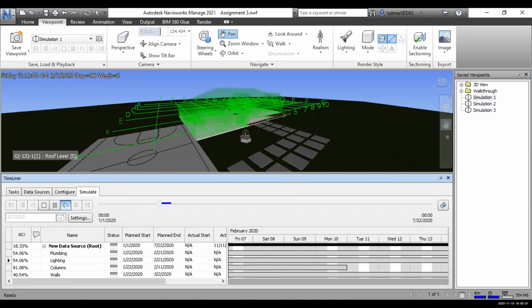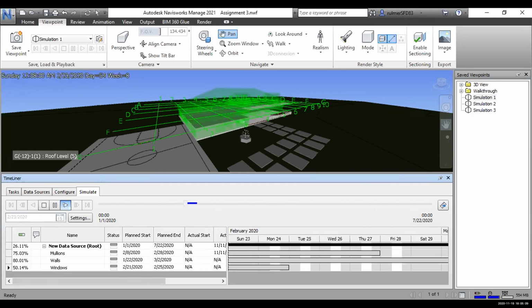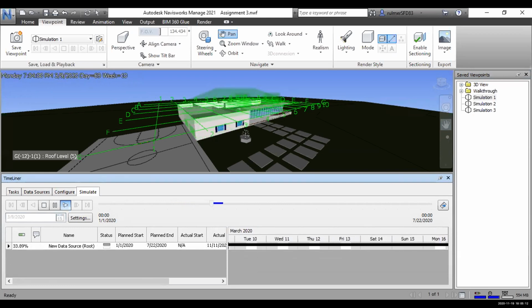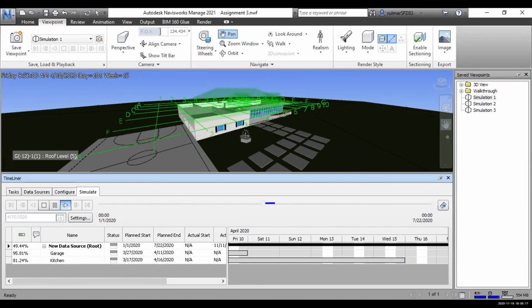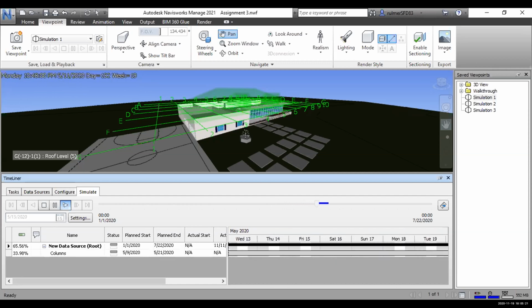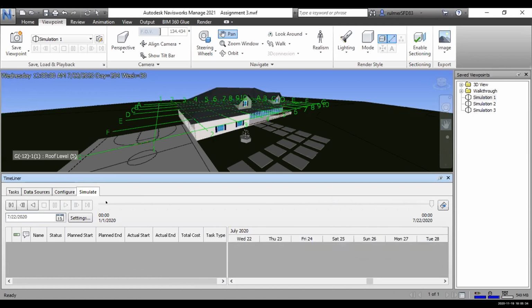And I dealt with a lot of the exterior pieces first, just because a lot of them could be done all kind of at the same time, in the sense of the critical path of the whole project, they didn't really interfere with each other. But it wasn't until you started getting into the interior and the inner workings of the house where you actually started to see things that needed to be done before other pieces, for a perfect example, like the roof can't go on until everything else is really done. So that was the first point.